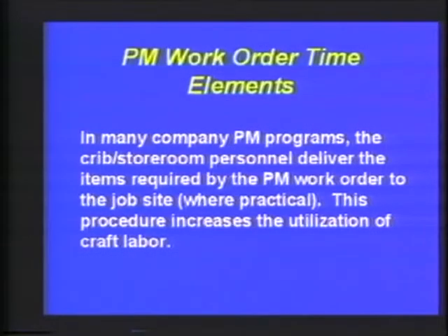Now, the last item on page 5C is the development of the PM work order itself. In many company programs, the crib, the storeroom personnel, may deliver material to the job site. And it is that function which likewise can reduce the travel time, especially in a sequential scheduling operation. So this becomes another key consideration. Not all PM orders can have material delivered to the job site because of, let's say, safety features in the operating area. But it should be considered.